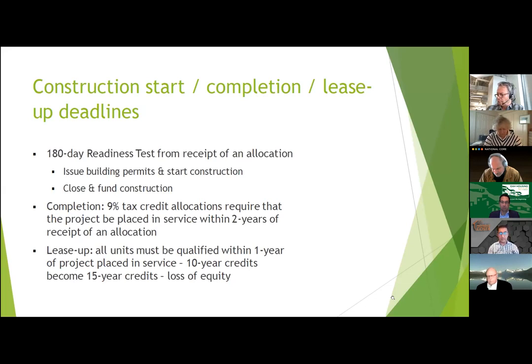The 9% tax credits, which we distinguish from the 4%, have a separate federal requirement that you need to place them in service, meaning for the purpose intended, a temporary certificate of occupancy or a certificate of occupancy, within 2 calendar years of the calendar year within which you received the allocation. So that makes those drivers very critical.